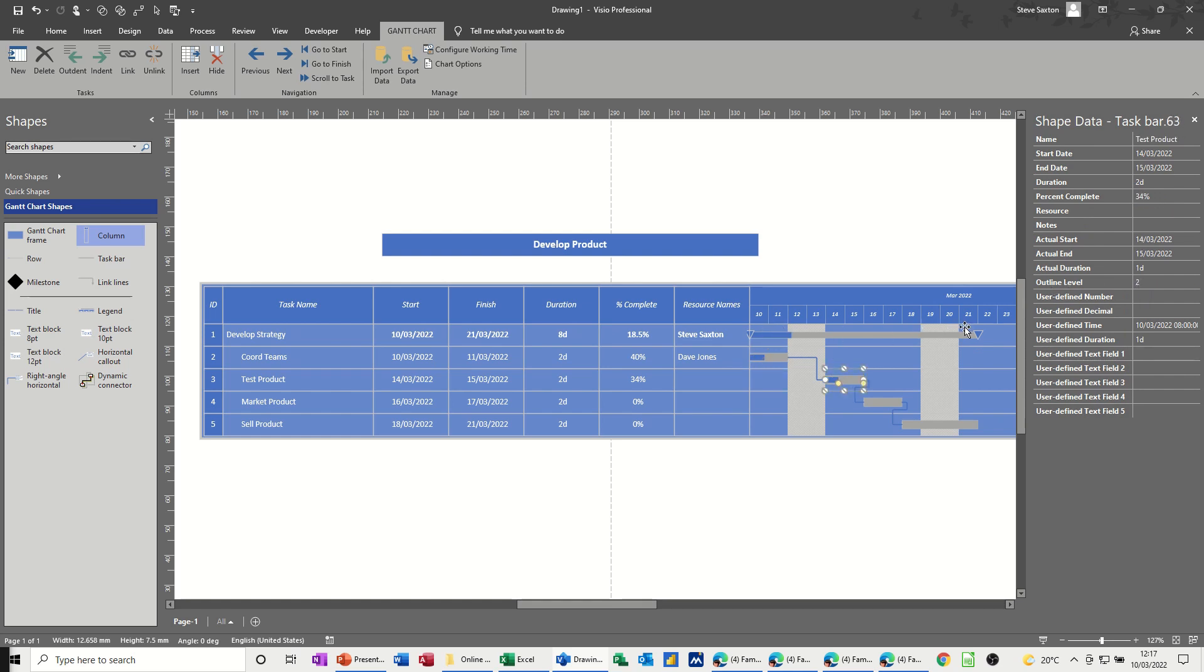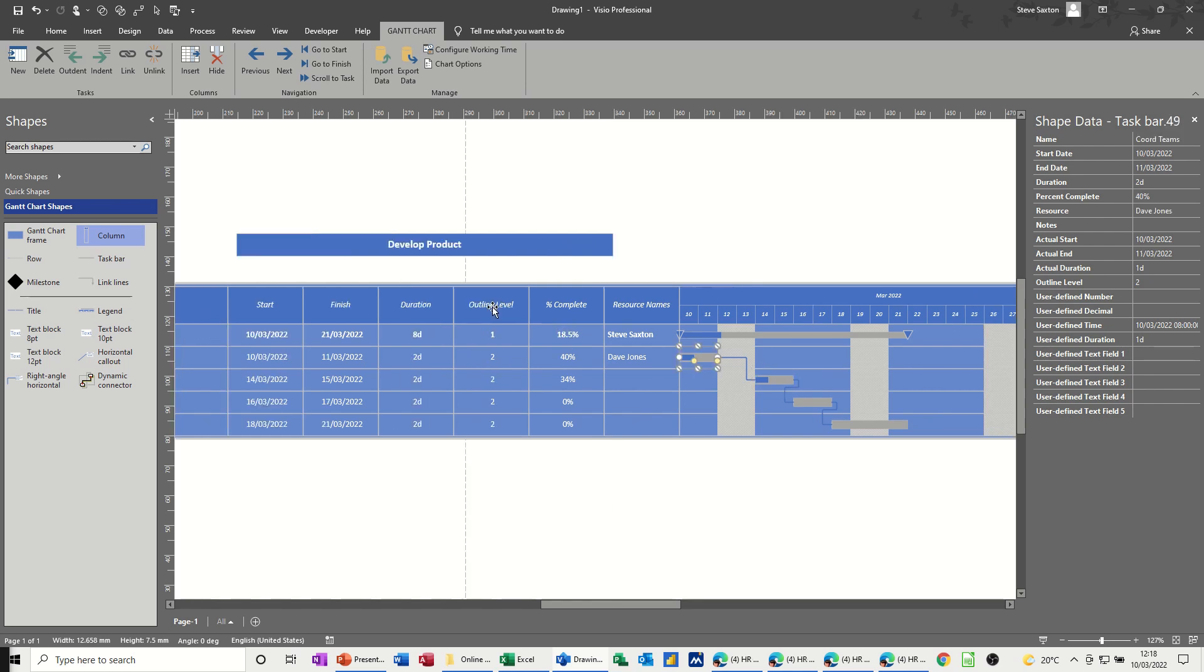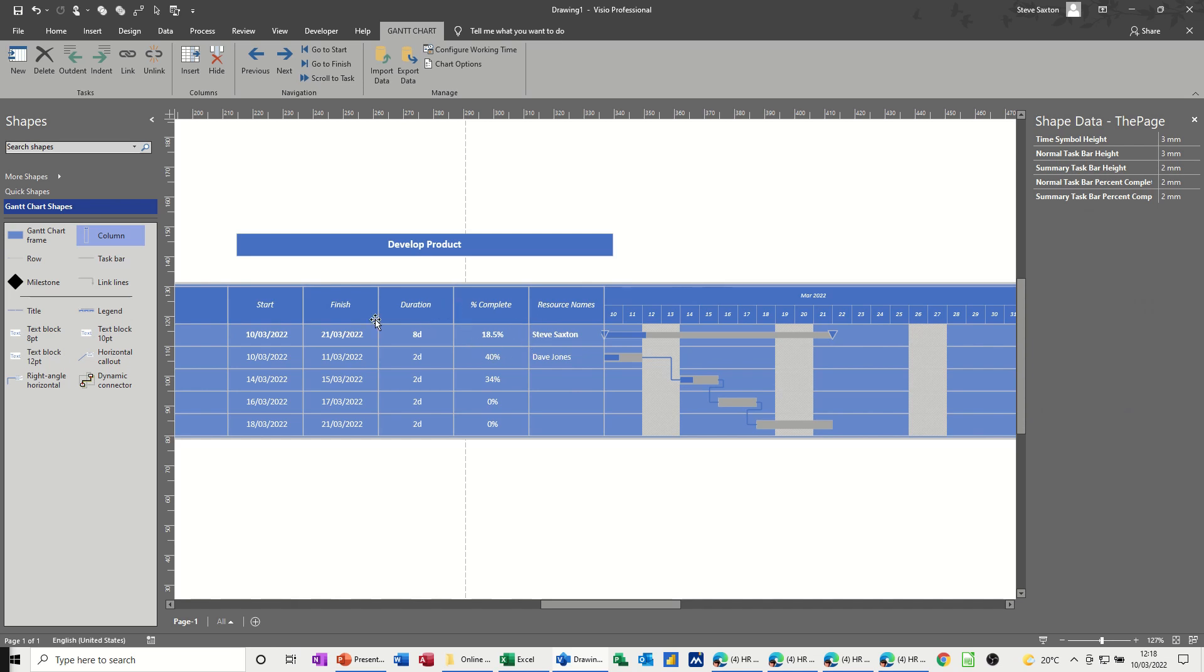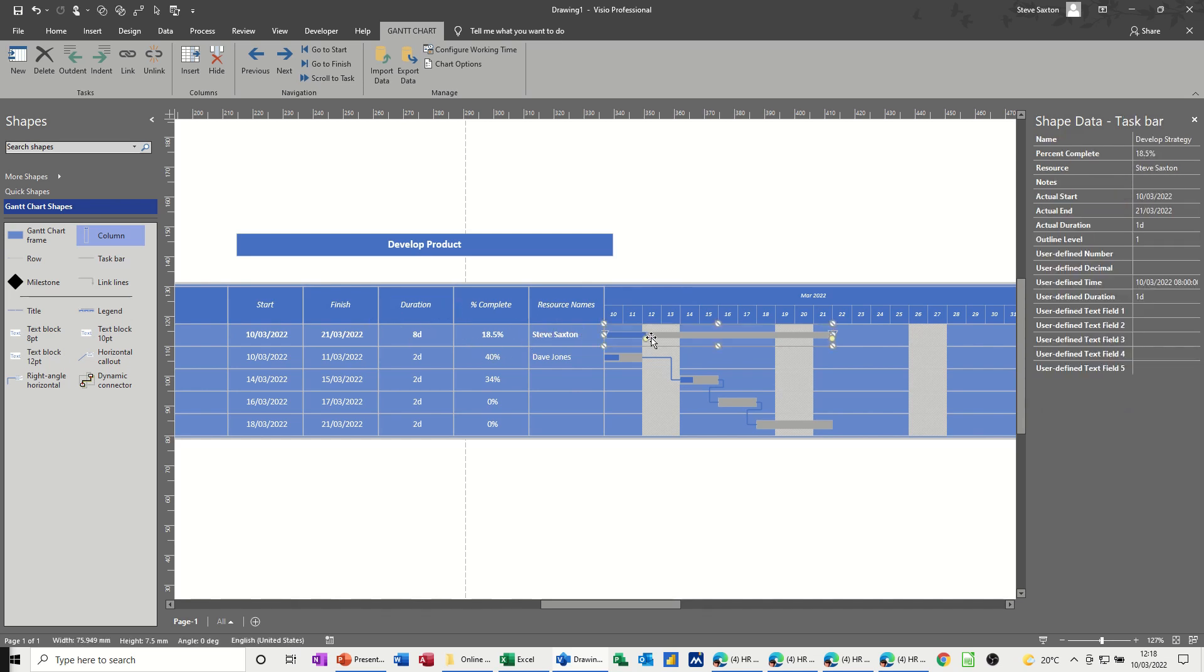So this is now a summary task, if you like, and then you can see these two little triangles on either end, and that is the percentage complete of the project, even though these are 40% and 34%, the overall percentage complete is that. You can hide the column afterwards if you don't want to look at that. If I just hide that, you know, if it gets too cluttered, because all this information that you put in in these columns is sitting in here, really, so you can see it there, there's the resource, I haven't typed any notes, and there's the outline level.